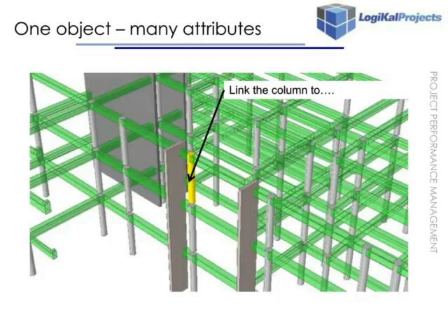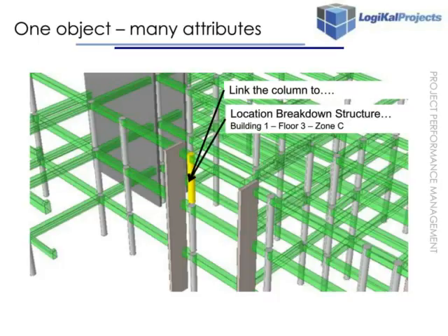And I'm going to be concentrating here on the project controls data, but Graham will take that forward later to look at other pieces of technical data. But from the project controls side, the first thing that we need is a location for that column, quite clearly. For example, a building, a floor, a zone. Because one of the things that's important in controls is to start to look at your progress in particular areas of a project, not just overall.